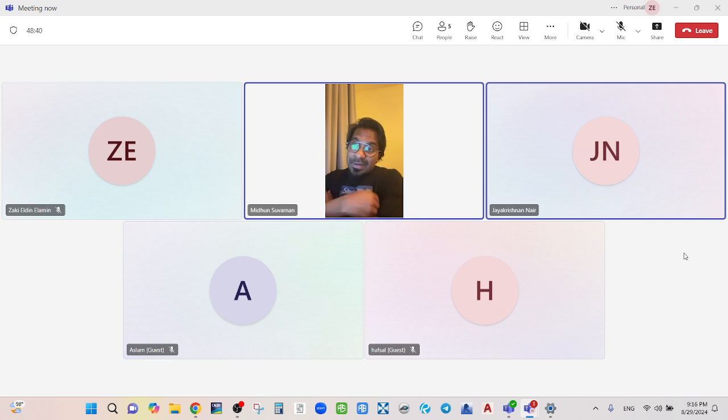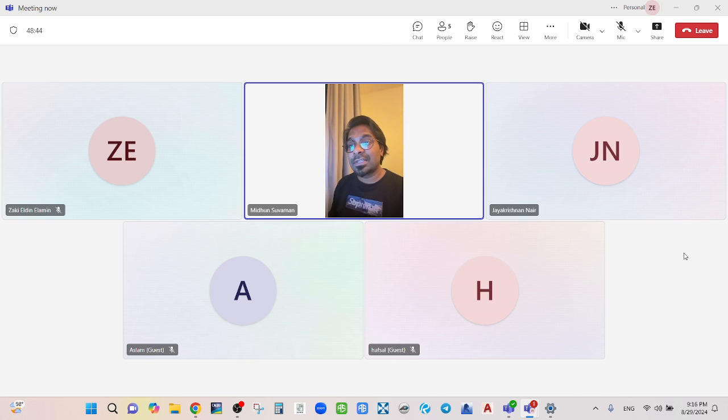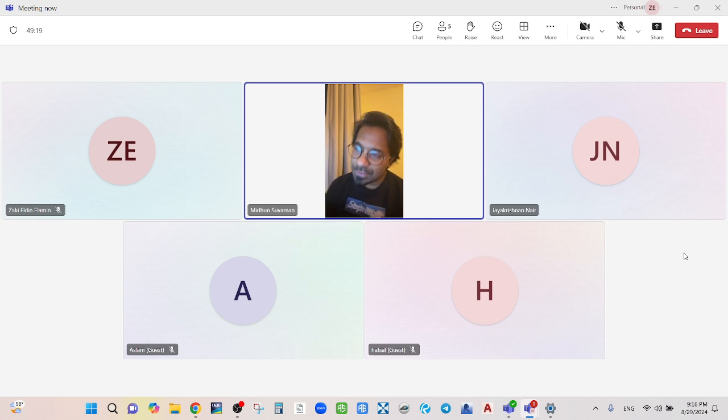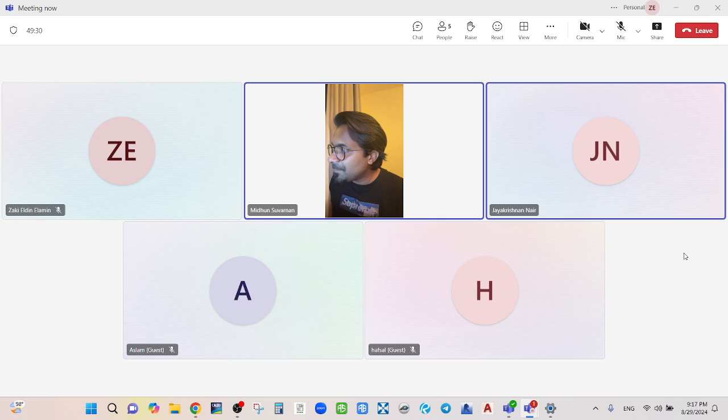Clear? Yes. But imagine if you ask me to submit 30 percentage of security. I'll go to the bank and the banker will say, bro, I cannot give you this big a guarantee. And I will say, no way, bro, I have to get it because this employer is asking for 30%. Then he will say, if you want 30%, you have to pay me an extra premium of 1 million. So that 1 million plus my OSP, I will submit in the bid. So instead of 10 million, I'll be submitting 11 million or something like that. Got my point? So when you specify a percentage, that impacts your bid also. Whatever you ask for in a contract or additional, he will give you, but at extra cost. Now clear?